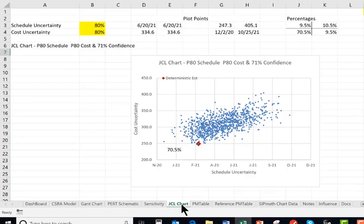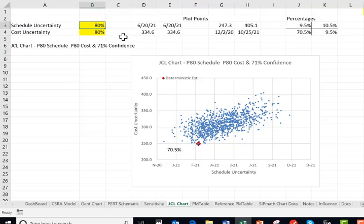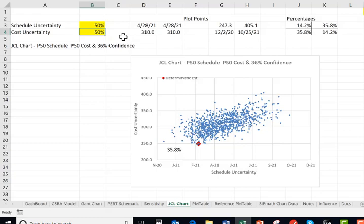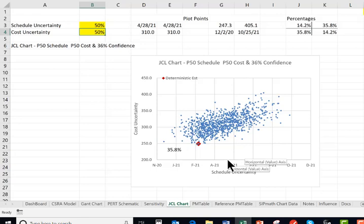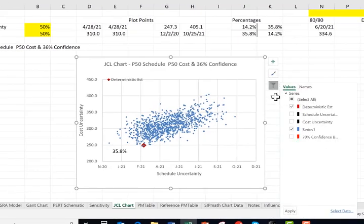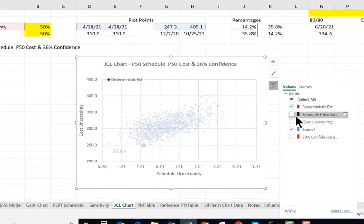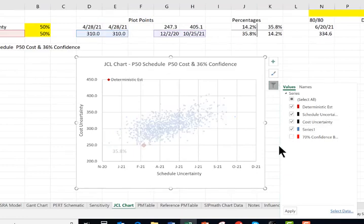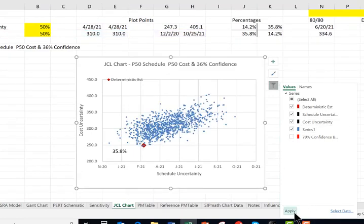Over here, we now want to understand what it looks like if we had a 50% confidence in both cost and schedule. Let me start by putting in the 50% over here. We're going to later on adjust these. Now I'm going to add in a line vertically for schedule where the 50% schedule is, and a line here for the 50% cost. We'll select on the graph, go to filters, and we'll get the schedule uncertainty and the cost uncertainty.